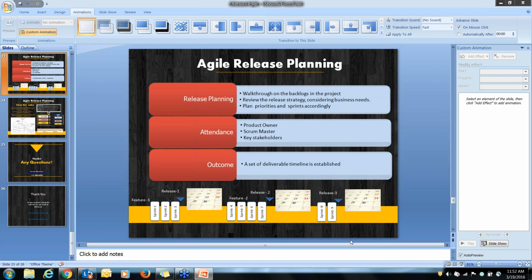Then he goes to the product owner, and they reprioritize and come up with, okay, we can only deliver this particular chunk. The product owner will then speak to the customer, and they might remove some features and pick up only the features which can be incorporated in that particular duration and deliver it to the customer.